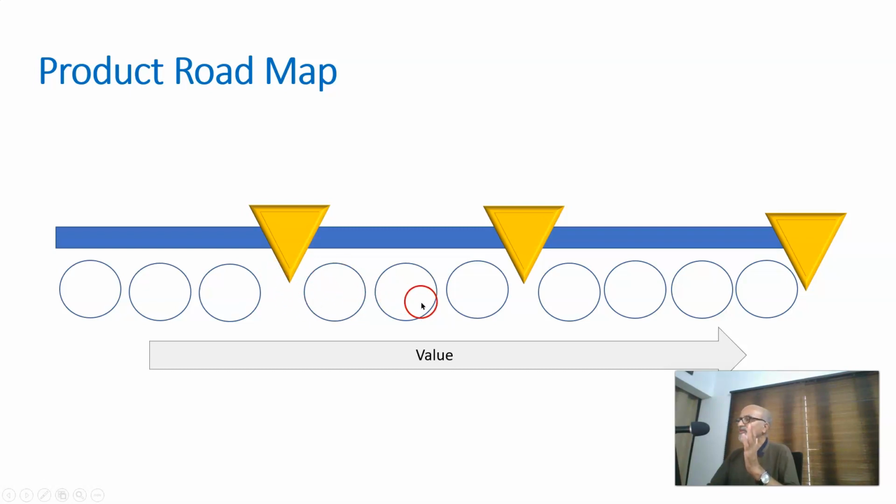Then move on to Agile project management, make a release. So the customers can start learning instead of doing a big bang release at the end. If I do these incremental releases, the customers get value by way of they can learn without much delay. They need not wait. As and when things are ready, they get value out of it.